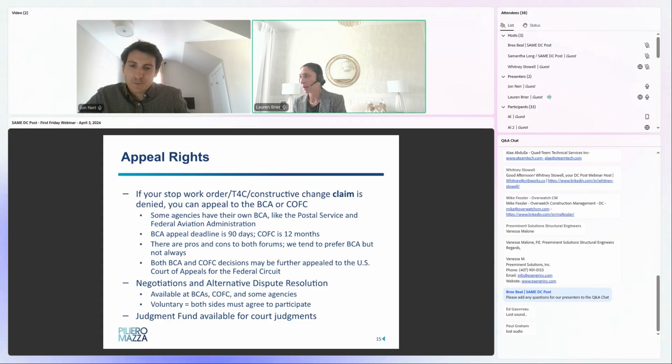When we appeal to the Board of Contract Appeals, sometimes there's more of a willingness to negotiate an off-ramp, versus going through protracted litigation. Because the agency is represented by its own attorneys, they're a little bit more privy to what's going on on the ground as far as the dispute. So there's some benefits there as well. Both forums offer alternative dispute resolution processes, but again, there's more inclination to exercise those processes at the Board of Contract Appeals earlier in the process than at COFC.